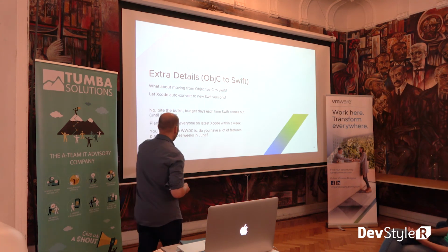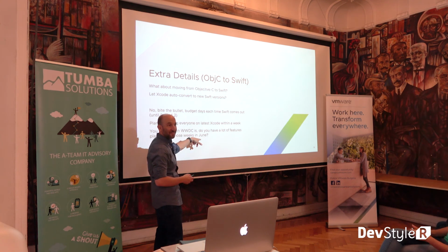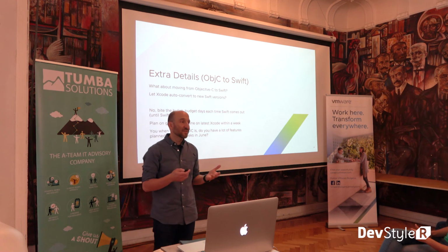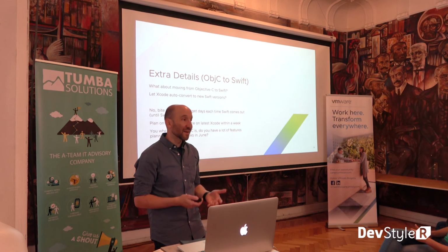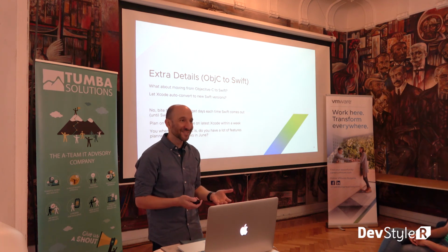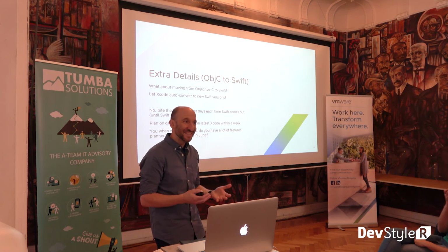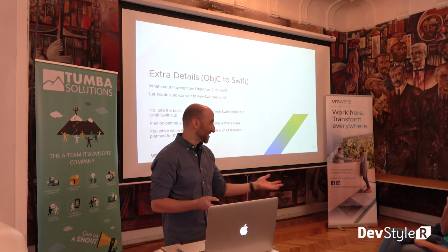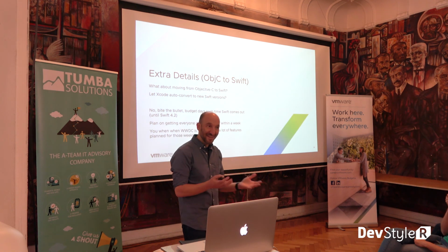So there are certain things that happen at the same time every year, right? And it makes sense to plan around it. Just like here in Bulgaria, you don't want to plan around having a lot of development done around Easter and the week after Easter, right? Nobody was showing up to work. So you have to know those things and plan around. Hey, May is a really busy month. Like this Friday, right? These guys aren't showing up to work. It's a holiday here for you guys.